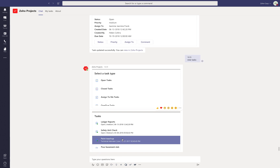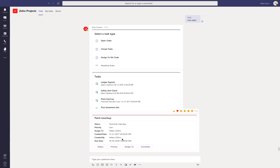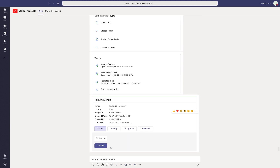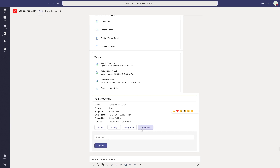You can then select the tasks that you want to see a brief summary of. When you view tasks, you can edit the task details such as the Status, Priority, Assignee, and Comments. The actions you perform in the Channels Conversations tab using the Zoho Projects bot can be viewed by all the users in your team. However, if you want to view the project or task details in private, navigate to the chat in MS Teams and click on Zoho Projects Private Chatbot.